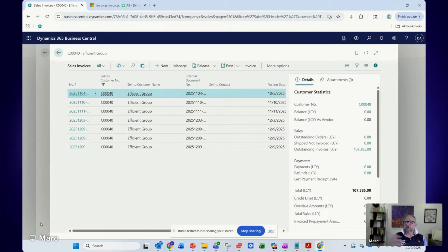But then also if the PM says, okay, I've released this milestone. We've seen countless times with our customers before TechStack where they just forget to invoice milestones. So there could be a $50,000 milestone and you completely forget to invoice it. And by the time you realize, the project could be in code red, maybe the project's closed, and you've got to go back. That just makes for awkward conversations with the customer. So you want to make sure that's done timely.